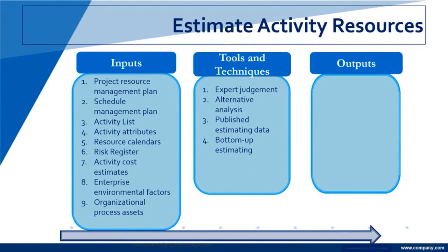We also look at bottom-up estimating, so the bottom-most rung, building it from a piece part all the way to the whole. And project management software, again, it's a source. It's a place where we look to see what is the algorithm of how that software is put together and how it is adding in the resources to activity and relating those and giving us estimates.